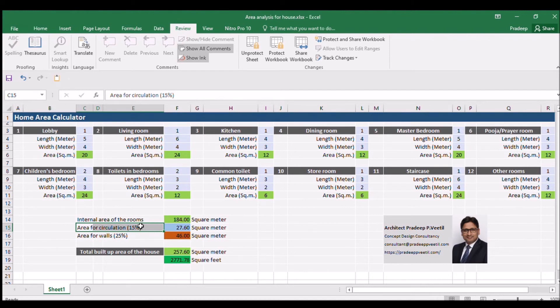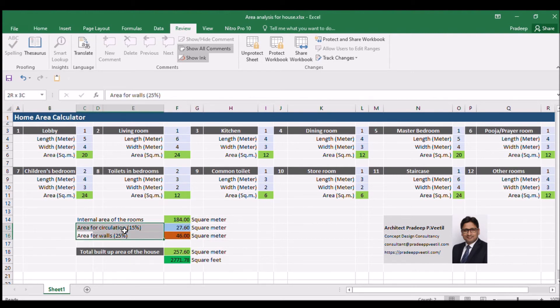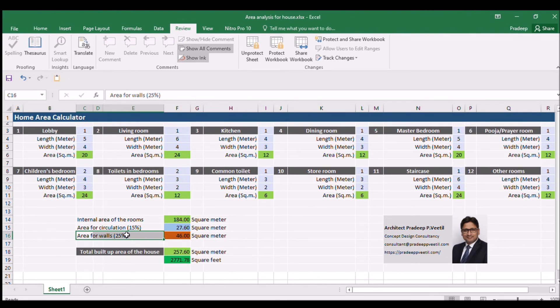The total area for circulation for this project is 27.6 square meters. We also need to add 25% of total internal area to calculate the area required for the internal and external walls.